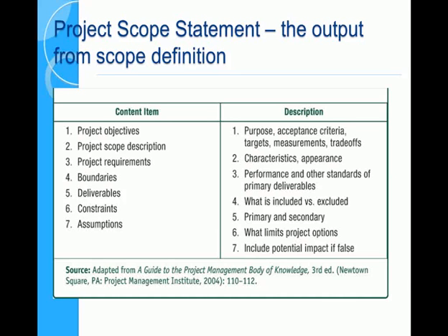The things that we believe to hold true that will work for this project, and we don't need to worry about it, we don't need to manage it. If we test that assumption and we find that there is a possibility that what we thought would hold true isn't, it comes out of that assumption bucket and into the risk bucket, where we have a series of procedures for managing, mitigating, transferring risk.